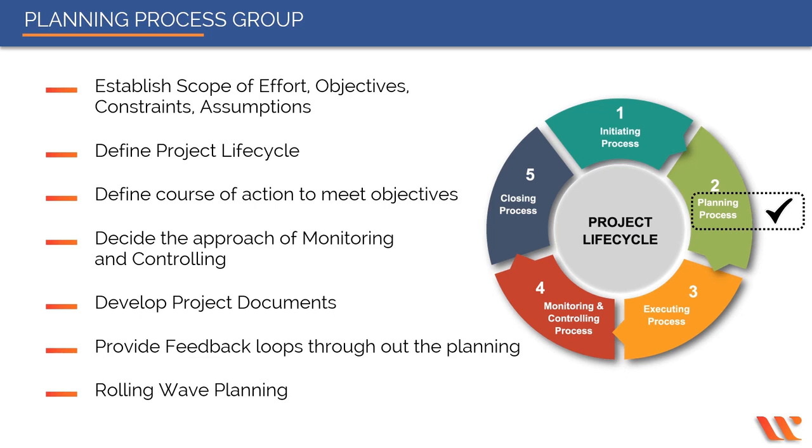So, for example, you need to work on a project which will go on over the next 3 years. At the planning process, you will only have information or clarity over the next, say, 3 months. So, you make the project plan and factor in milestones and deliverables based on the information you have available. You put in budgets, resource estimates, etc. based on current information. As the project progresses and you get more clarity, you keep adding these to make your plan and estimates more up-to-date and elaborate.